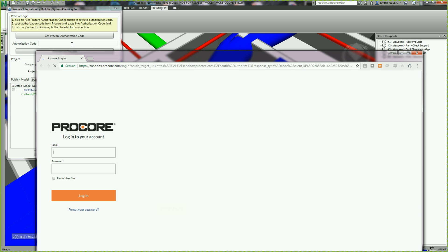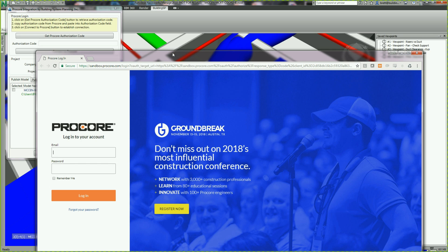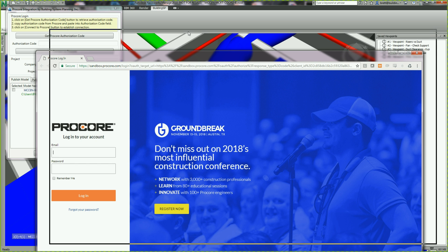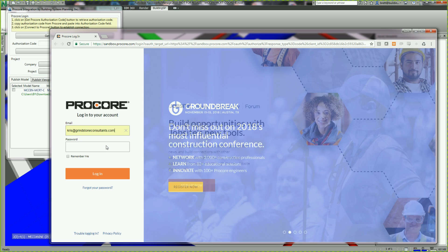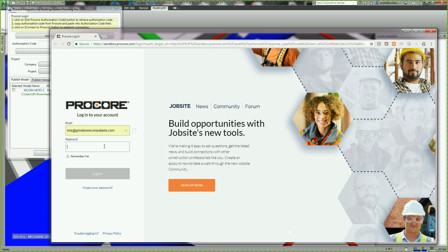In this demonstration, we'll use the A2P Toolkit to upload viewpoints from a 3D coordination model to Procore, creating observations in Procore for each viewpoint. The first step is to authenticate with Procore.